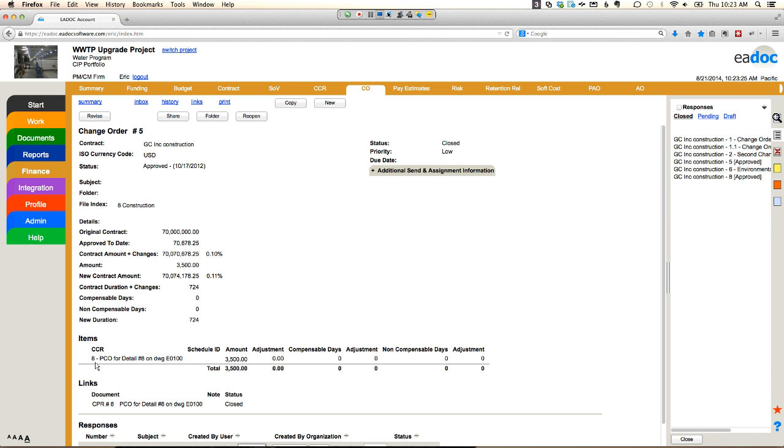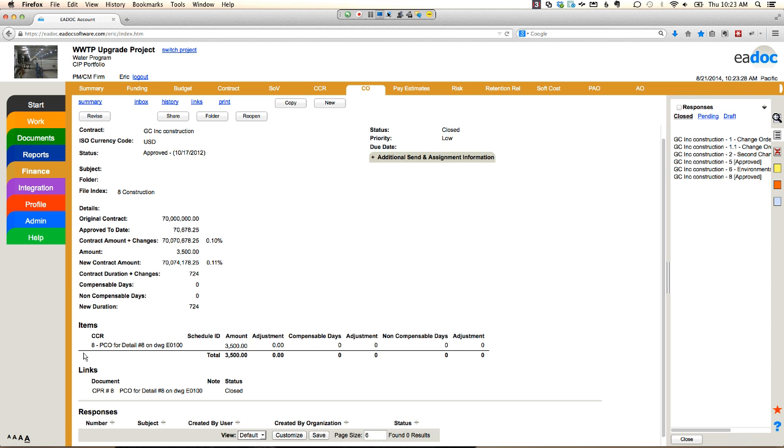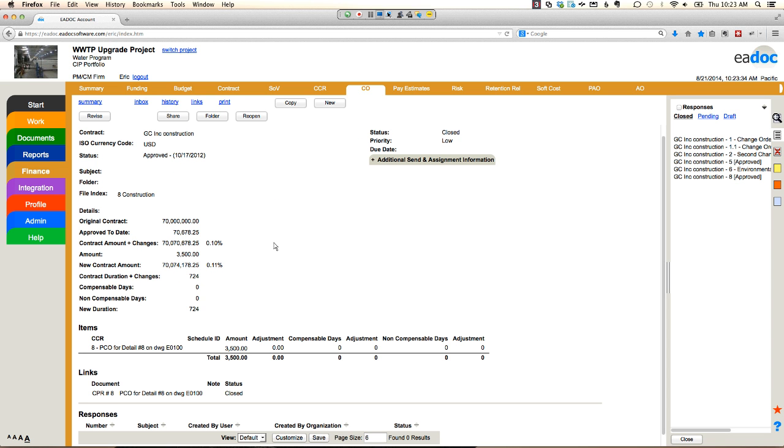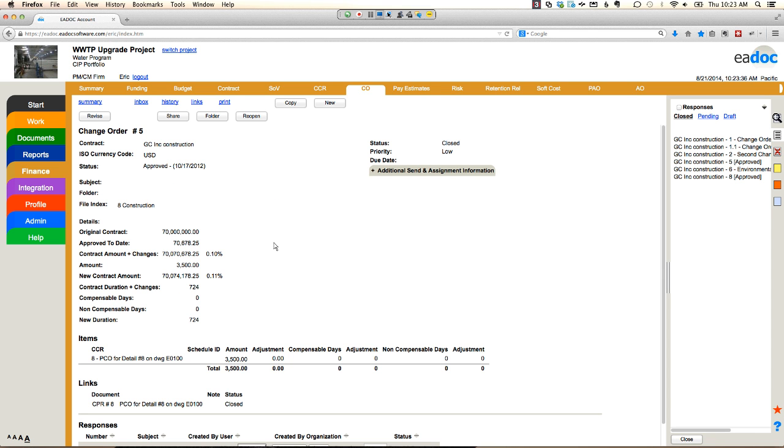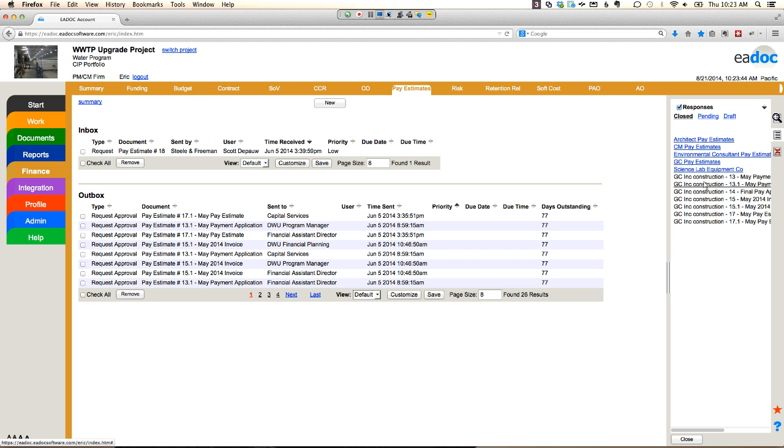And our change order can encompass multiple cost proposals or a single one, depending on our process here in the system. And the change orders, we can route these around for review and approval. We can have multi-user approval processes. We can do electronic signatures, or we can print these out for wet signatures. Once that change order is approved, then it's going to update my payment application.